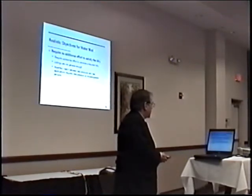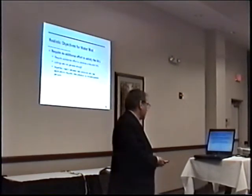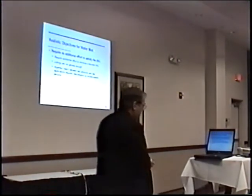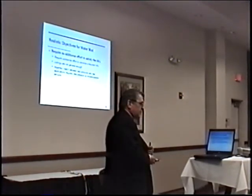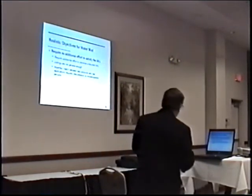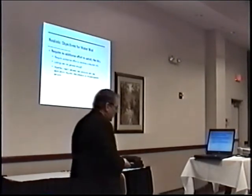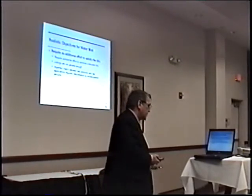What about whether water mist systems could be as easy to sell to the authority having jurisdiction as a standard sprinkler? Well, answer, no way. The water mist systems are a pioneering effort. Authorities having jurisdiction have to be convinced, and the listings are never complete. There's a whole lot of holes in the infrastructure that supports the things that would allow an authority having jurisdiction to accept a water mist system as an alternative to sprinklers. So I don't think we can say that it requires less effort to put in a water mist system.